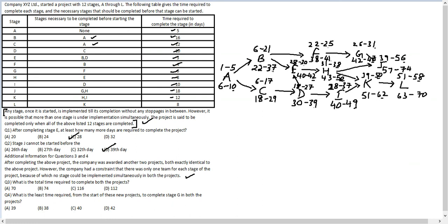The numbers above each stage refer to project 1 timings and the numbers below refer to project 2 timings. For question 3 — the total time to complete both projects — the answer is 74, option B. For question 4 — the least time from the start to complete stage G in both projects — that is day 47.